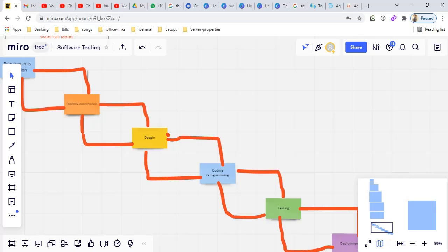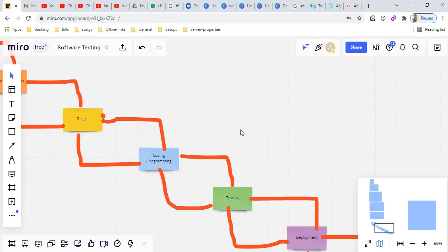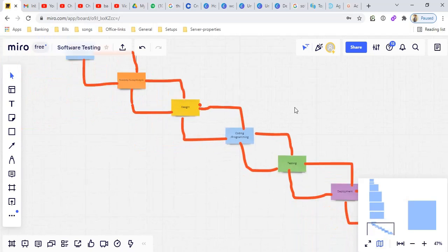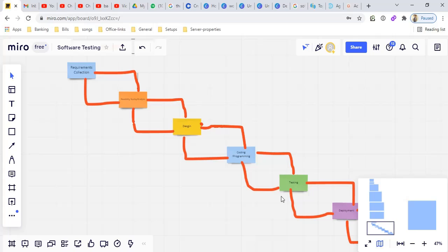And testing is done only after coding. If you see, testing comes after development. So the testing team is idle from the requirements phase to the coding phase. They get involved only in the later phase and get less time. Hence, it will be very difficult for the testing team to cover all the use cases and all the test cases.